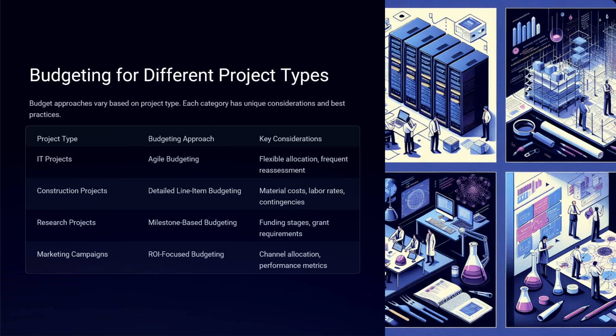When we create the budget in the system, we give it a WBS, which is a unique identifier number. Then within each project, we can find different cost items like material costs and labor. This method carefully tracks materials and labor costs and includes contingency to prevent overspending.